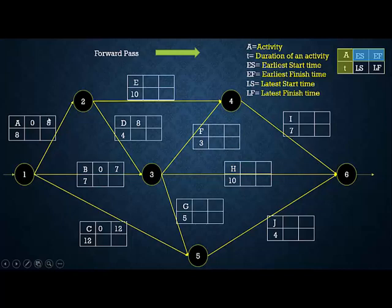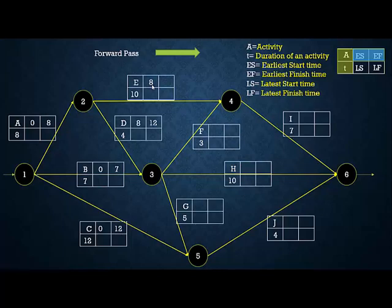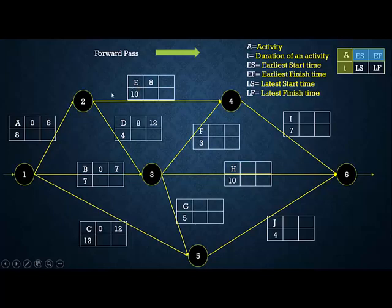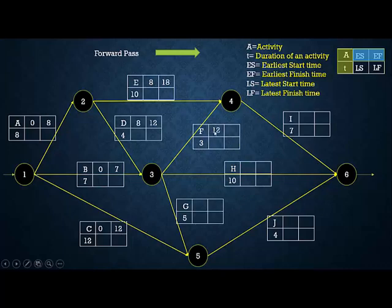Activity D needs input from activity A, so its ES equals the EF of A, which is 8. Therefore EF of D = 8 + 4 = 12. Activity E also has A as its preceding activity, so ES of E = EF of A = 8. The EF of activity E = 8 + 10 = 18.